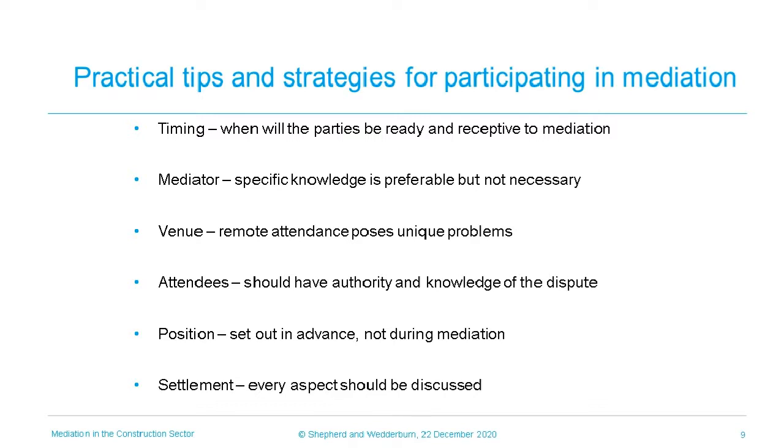This problem commonly occurs when dealing with the public sector, as council officers may not automatically have this level of authority. However, we have acted both for and against the public sector in mediation and know that it can be made to work. As part of their preparations, the public sector party will have to consider a full range of possible settlements and seek advance authorisation to settle within that range. This will allow those attending the mediation to conclude on that basis. In essence, there is no difference from a private sector party deciding its top line and bottom line in advance.